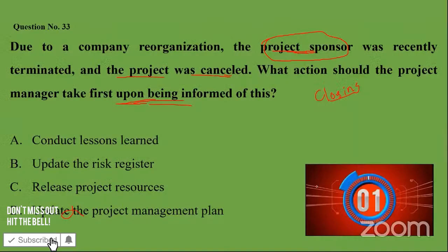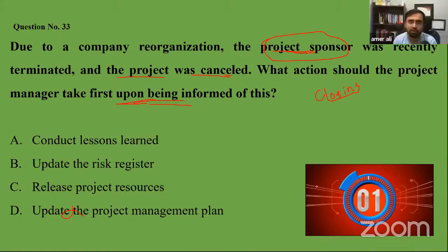Yes, Zakriya, go ahead. Yes, I have a question. If we can go back to the question real quick. Let's say the project sponsor was terminated and then the project kept going. Would it still warrant the same response? No, just update the issue log. An issue has occurred, so we update the issue log. Clear? Okay, that's good.